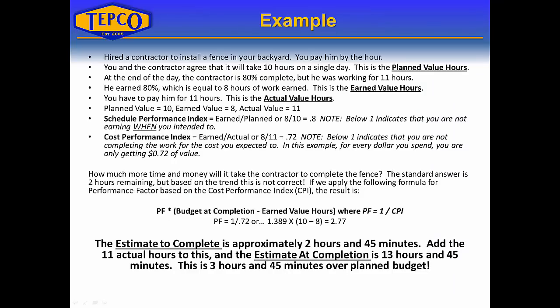Let's look at a simple example that covers all three components: planned value, earned value, and actual value. Say you hired a contractor to install a fence in your backyard, paying him by the hour. You agree it's going to take about 10 hours on a single day — that's the planned value. At the end of the day, the contractor is 80% complete but was working for 11 hours, so he earned 80%, which equals 8 hours of earned value. But we have to pay him for 11 hours — that's the actual value.